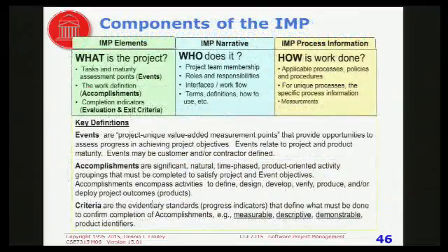Here's a little more detail about what's in an integrated master plan. And if you think about it, all it's doing is saying who does what and how for the project. This team is going to develop the electrical system, and this team is going to develop the software that runs on the computer, and this team is going to develop the chassis, and this team's going to do the marketing, and this team's going to do the installation, and here's how they're going to do it.